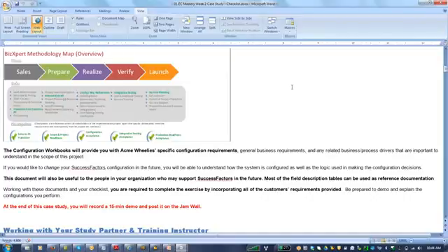Things can go wrong in the realization testing phase, where the systems will not be in sync and some issues arise. To fix that, it would probably take a lot of coordination and effort with SuccessFactors, which might take some time, and because of that it could get delayed as well. There is a buffer as well, say about a month. They keep it as a buffer, and typically 3 to 4 months is what you expect for a project to be finished.